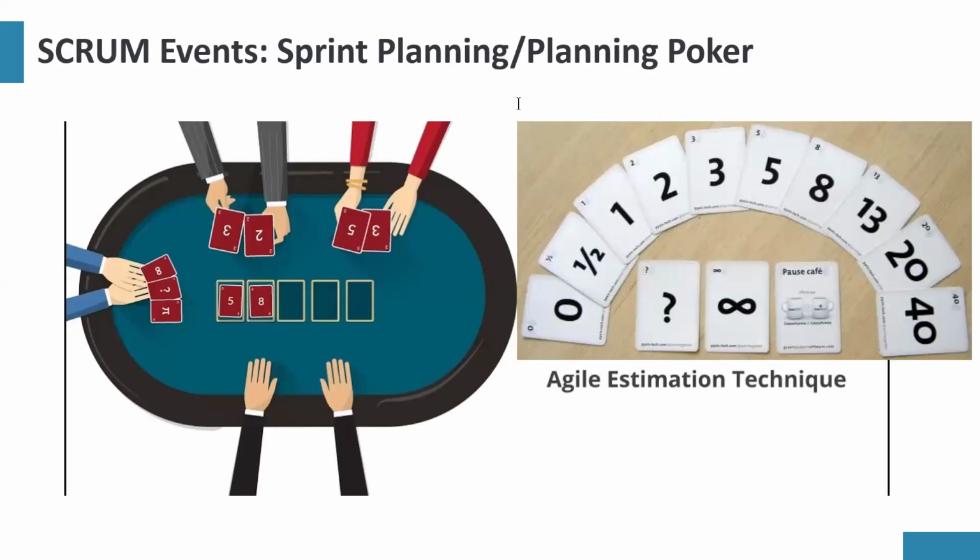So what do I mean by it? If they're close together, imagine that we have 40 cards and each one starts with 0, 1, 2, 3, 4, 5, 6, 7, 8, 9, 10. What that means is that when it comes to estimating, if you have 40 cards for each person, one may choose 5, another one may choose 6, another one may choose 7, another one may choose 8, another one may choose 9. And this makes it difficult to reach a consensus.